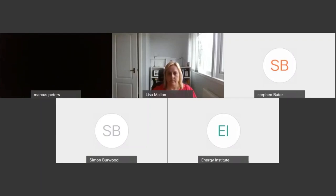A good example, we had one this week where we're talking about a hatch on a substation, and the ops person saying to the designers, well, that's great, but the major component I need to lift through there won't fit. So we need to make the dimensions bigger.